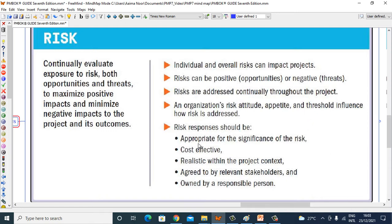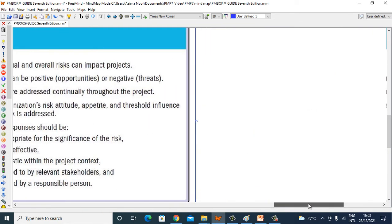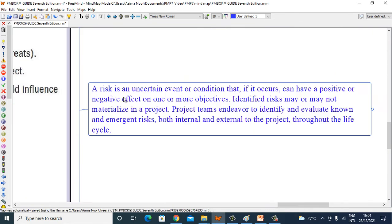Risk responses should be appropriate for the significance of the risk, cost-effective, realistic within the project context, agreed to by relevant stakeholders, and owned by a responsible person. A risk is an uncertain event or condition that, if it occurs, can have a positive or negative effect on one or more objectives.